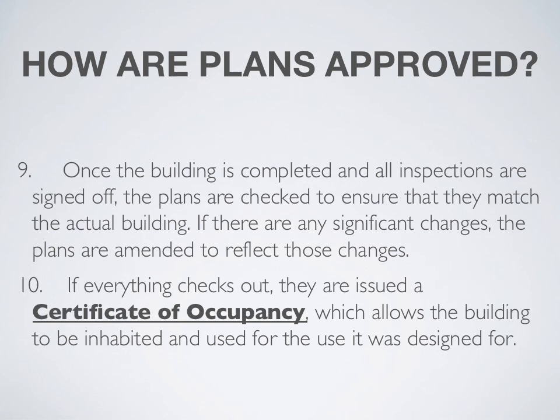Once the building is completed and all inspections are signed off, the plans are checked to ensure that they match the actual building. If there are any significant changes, the plans are amended to reflect those changes. And if everything then checks out, they are issued a certificate of occupancy, which allows for the building to be inhabited and used for the use it was designed for.